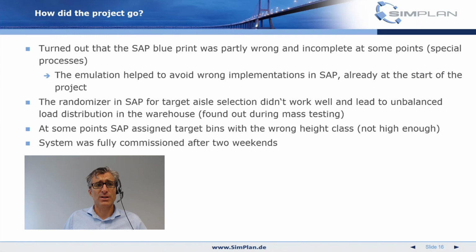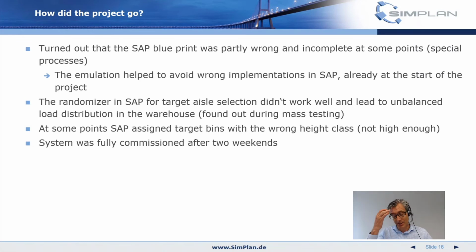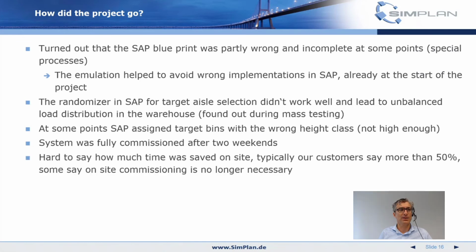So the system was fully commissioned after 2 weekends. So this was exactly how it was planned. So the virtual commissioning went over around 4 weeks. Sure, not full-time testing, but that was basically the testing period. So it's hard to say how much time was saved on site.